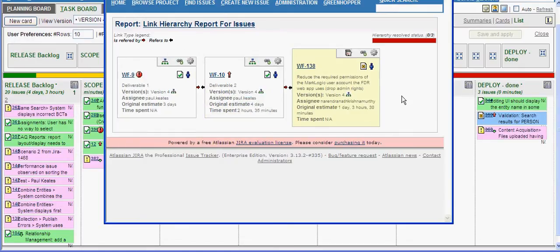So you can set your route for the hierarchy. What it's telling people to do is start here, do this, then do this. And you can have groups of tasks that, for instance, in the test world, first you want to do some data prep and set up type of test cases in order to build test data. Next you want to go ahead and manipulate the system in order to complete your tests. And perhaps towards the end you want to run reports. Well, you don't want to run the reports first because there's no real data in the system. Perhaps it's stale or old, so there's often a sequence that you want to follow, and this is how you could go ahead and structure that.